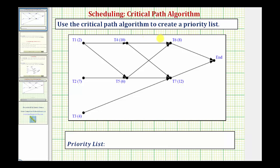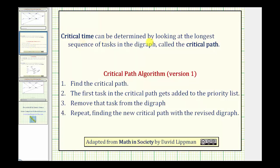We want to use a critical path algorithm to create a priority list from the digraph. Let's begin by reviewing the critical time. The critical time can be determined by looking for the longest sequence of tasks in the digraph, where the sequence of tasks is called the critical path. So the time of the critical path is called the critical time, and the sequence of tasks is the critical path.